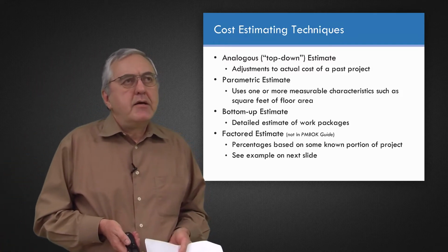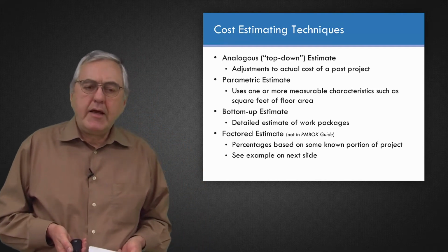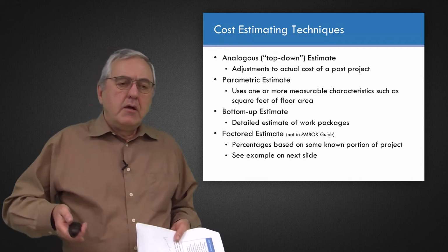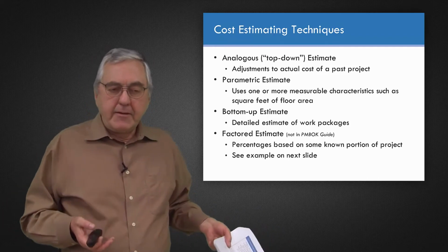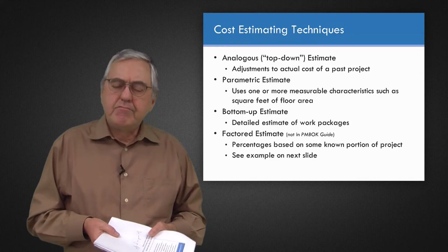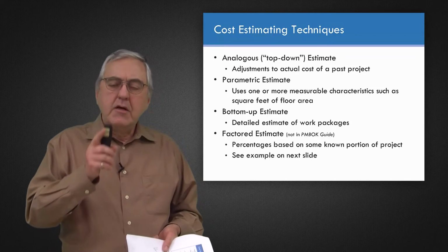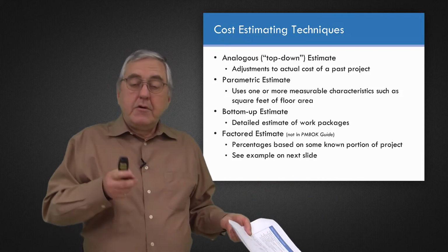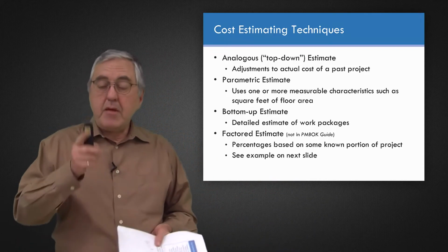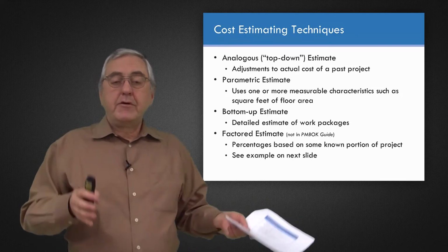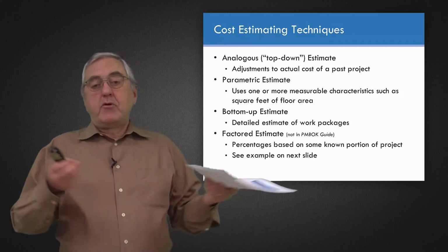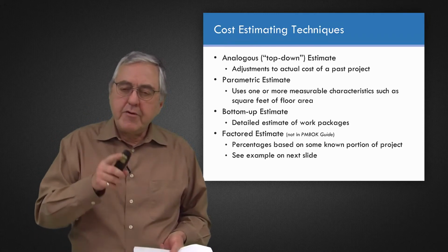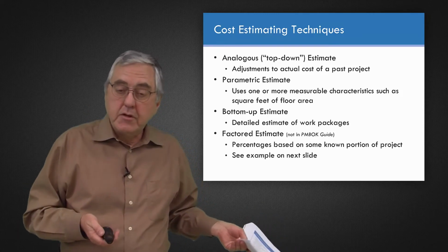You might be an engineer in some sort of a manufacturing plant, and maybe you do a lot of small projects around the plant. And for these small projects, you typically find out that on average, labor costs are equal to the materials that you're buying. So therefore, if you're estimating your next project, maybe you just do a quantity takeoff on the materials you'll need, price it, and make labor exactly the same. That doesn't sound very accurate, but maybe in the longer run you found that it does work out on average to be pretty close.